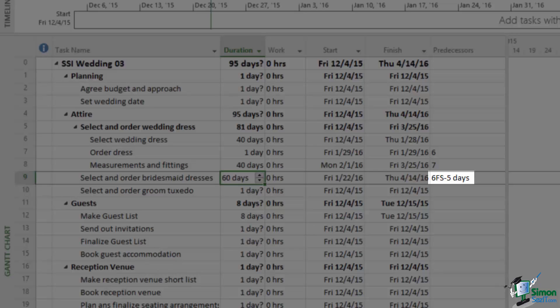So that code tells you that Task 9 has a Finish to Start relationship with Task 6 which means that six must finish before nine starts but there is a five day lead. So in effect Task 9 can start five days before Task 6 finishes.